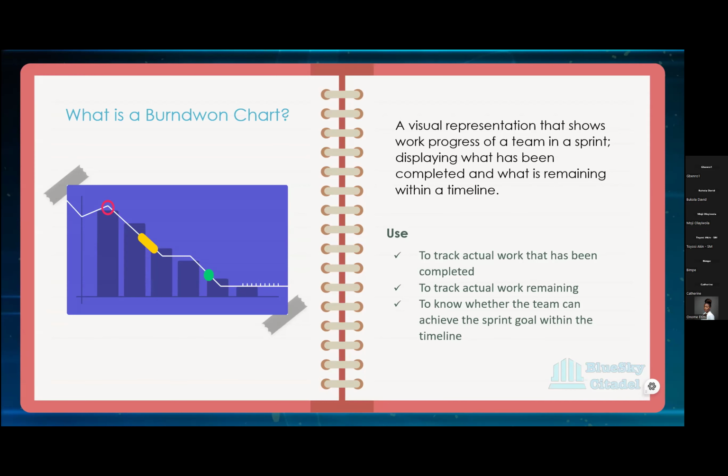In situations where you notice they're not doing what they need to do, either you ask them at stand up, or you do one-on-one. It's good to even ask at stand up because then you carry everybody along, rather than doing it one-on-one behind and asking somebody. And it could be that the PO wants me to quickly work on this, and then you can reach out to the PO to say, we have committed work that needs to be done. If this is priority, negotiate dropping what is low priority in order to accommodate the new work that is coming, if it takes priority over what needs to be done. So your negotiation skills need to come in there.